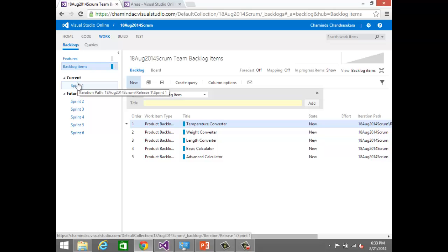You have to get him a barcode reader machine, and it has not arrived yet. So that is an impediment. That impediment work item may be assigned to you even. You have to bring it and give it to him. So until you close that item, he has an excuse to say, I can't start this, right? But that is visible, though it will not prevent him like in Project. In Project you had dependencies and that preventing mechanism, which is not there here, but you have something blocked. You can see that it is blocked due to an issue, right?